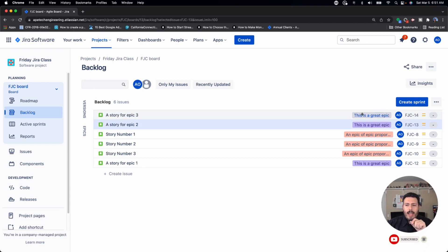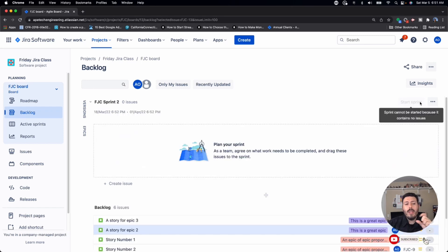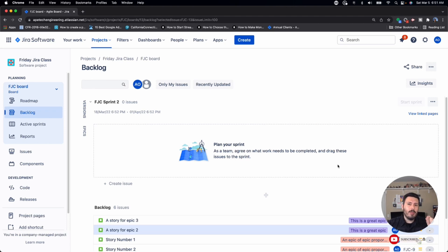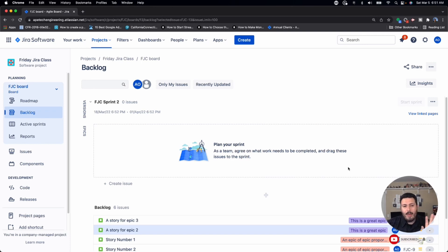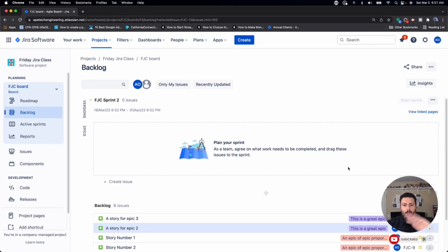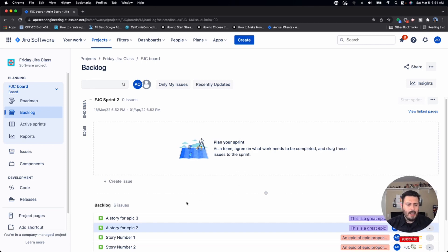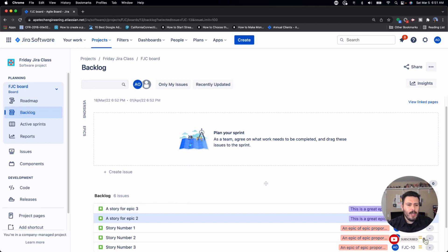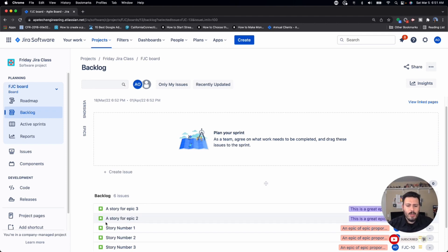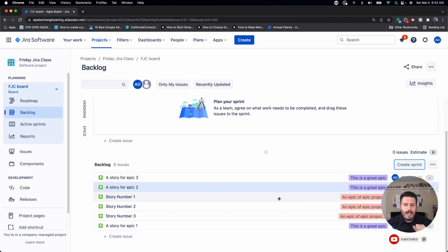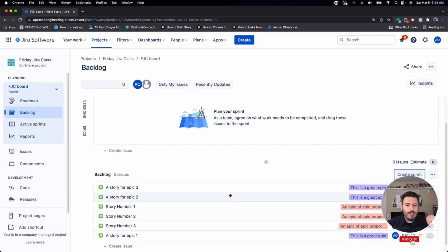Now, once you have items in the backlog, you're going to want to create your sprint. I recommend you only do one sprint at a time. I've seen many teams start creating a bunch of sprints and then start populating the sprints from their backlog. I don't recommend that. That is now you're starting to blur the lines between waterfall and agile. You can't predict the future in agile. So please, please, please refrain from creating a ton of sprints and pre-populating them because that is not going to be healthy. All you got to do at this point is start populating it. So now you're sitting in a sprint planning meeting with your team. You're the scrum master. You've already worked with your product owner to get this backlog populated. You've ranked it with your product owner. And now it's time to plan the sprint.